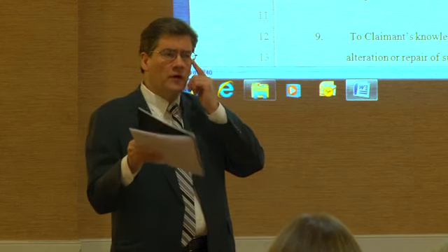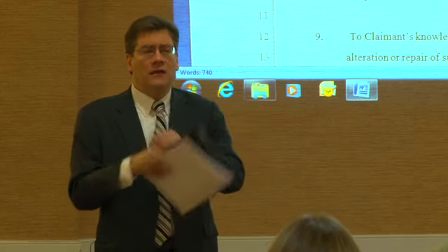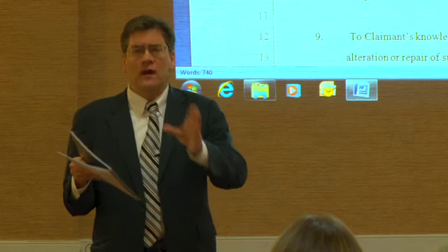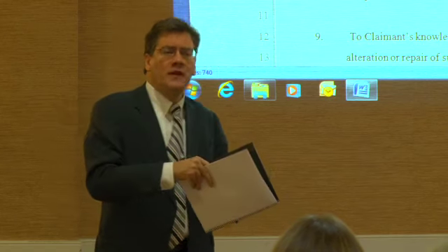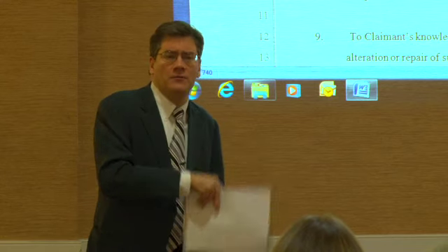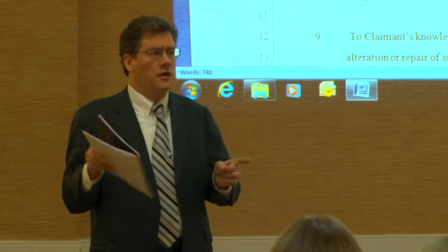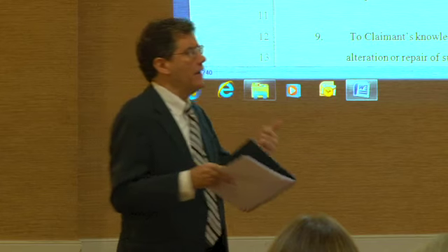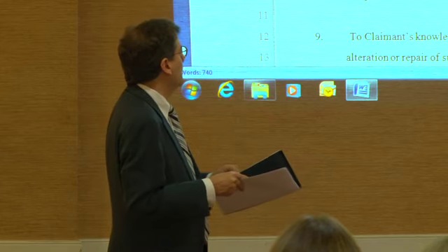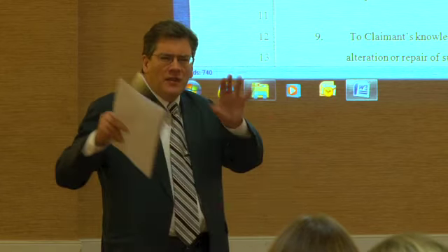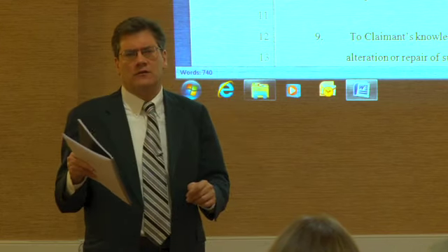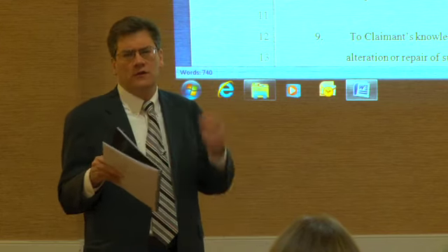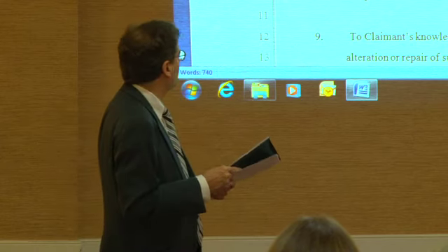Now if you have a subcontract and it's got the price term in there, then you've got a solid contract right there. It's complete. But the open account agreement is not the same thing as a closed account. The closed account must have a price term, and that's satisfied through, say, invoices or statements of account. And also, they have other dangling terms and invoices that might not be in the credit application, such as due on 30 days, 10% per annum, things like that.